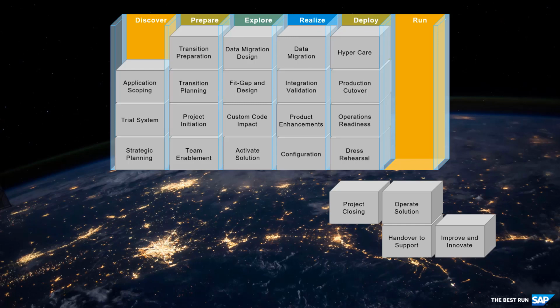The transition project has ended with the deploy phase. In the run phase, the aim is to establish a safe and efficient operation of the newly created solution. This includes the operations platform, core IT support processes, the setup and fine-tune of new or additional operations tools, and the enablement of the operational support team. Moreover, a continuous operations improvement should be established to improve IT operations based on newly gained experience.